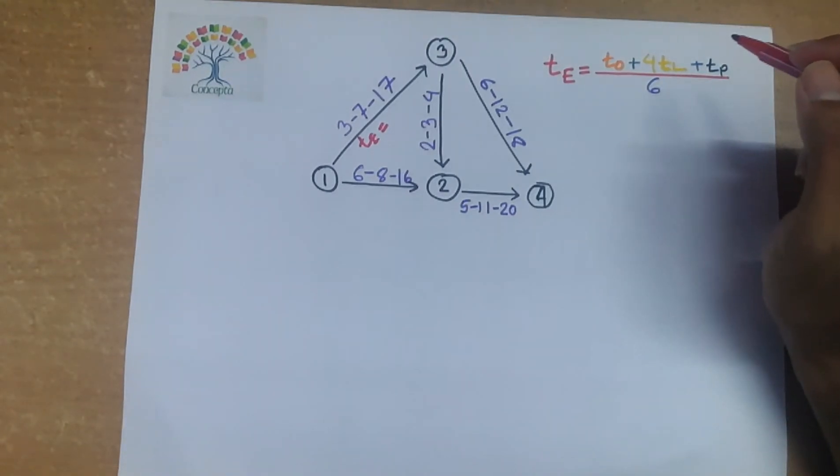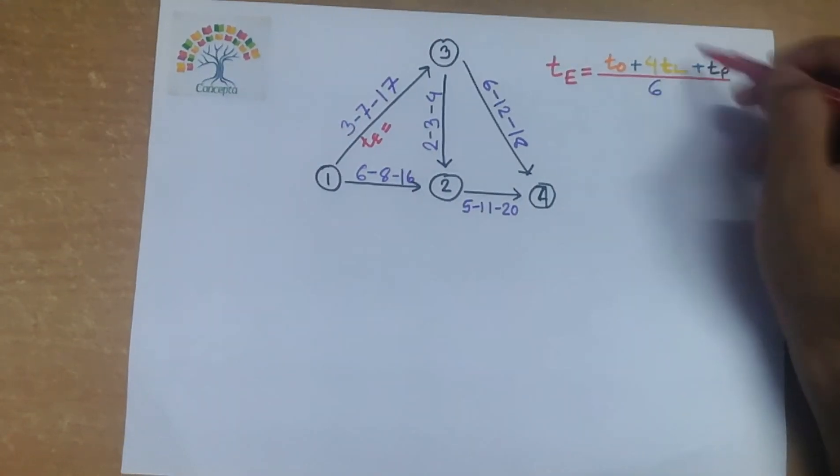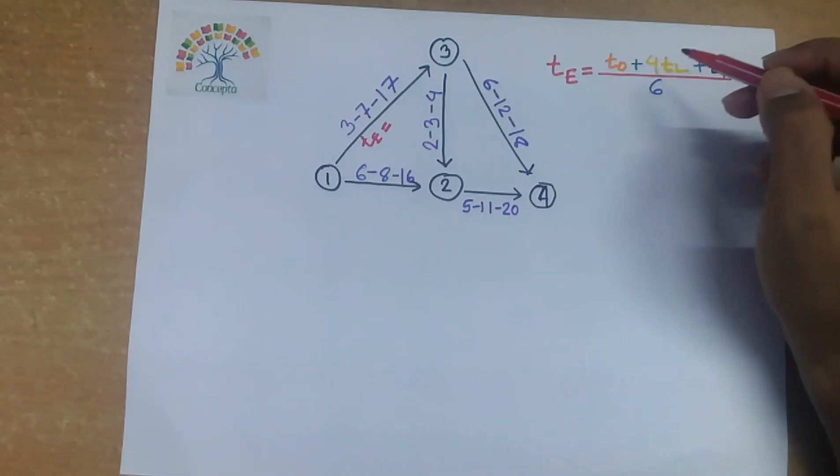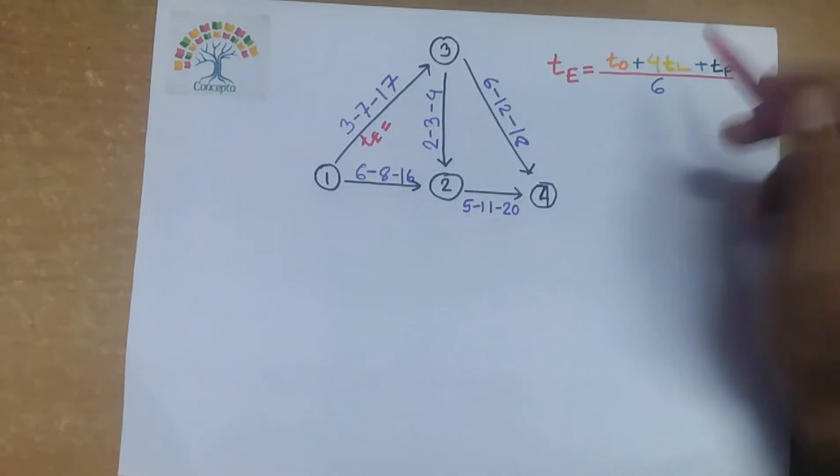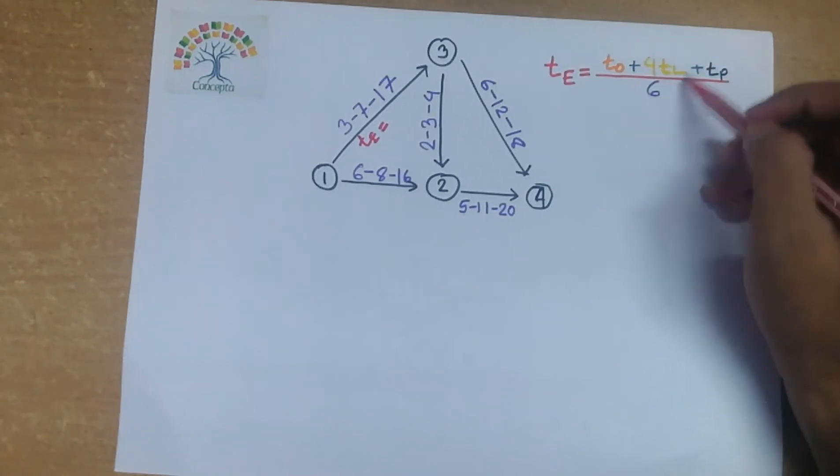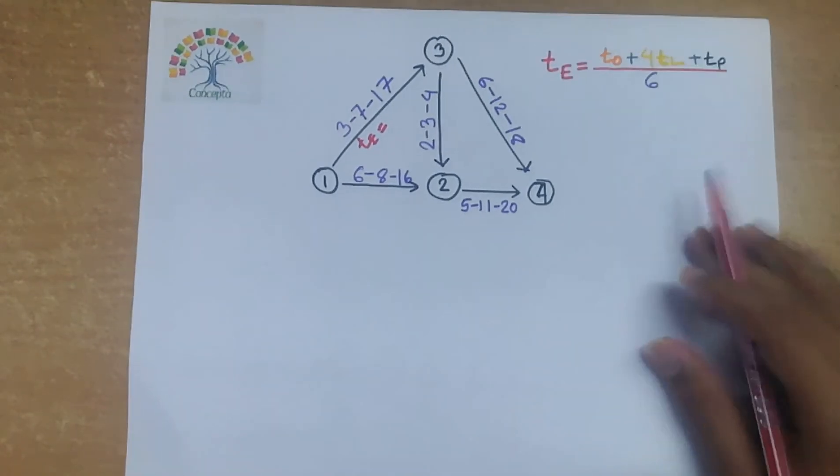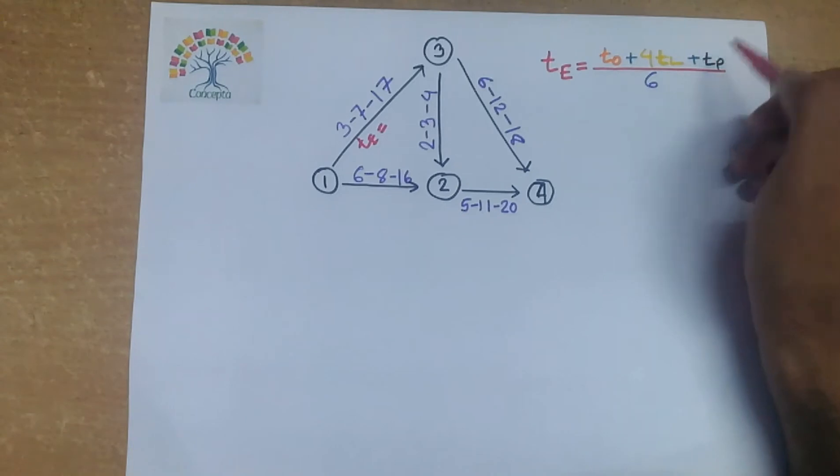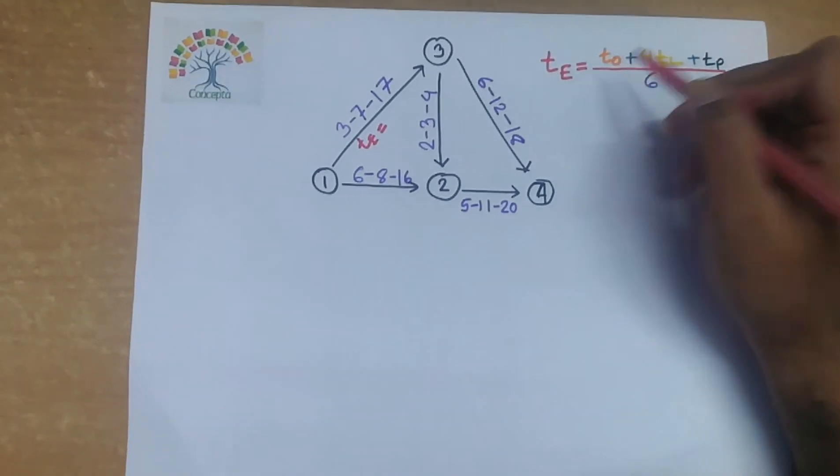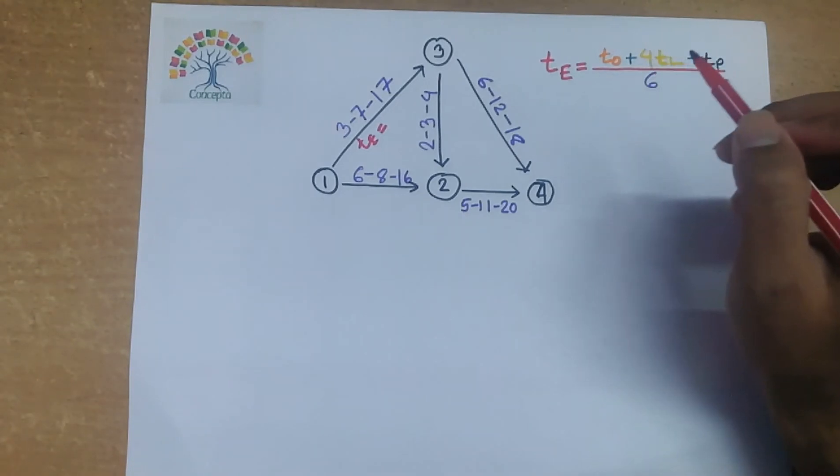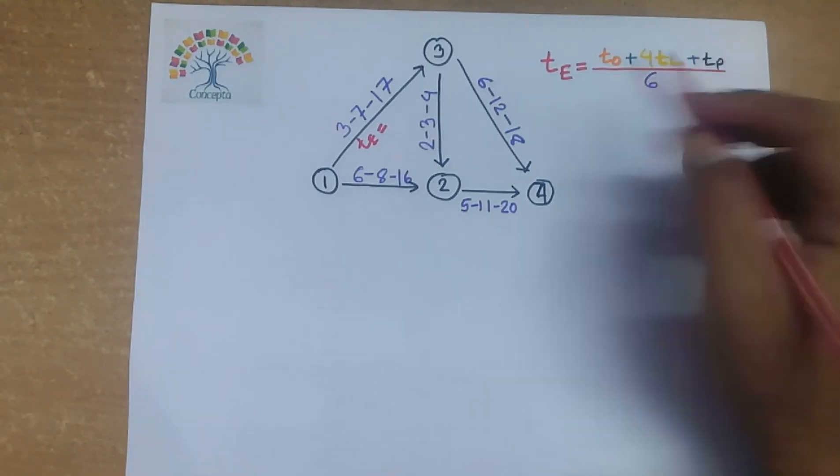Maximum people complete a work within this time, that is tl, so its weight is more compared with tp and t0. So coefficient 4 is written in front of tl, and there is a hidden coefficient 1 in front of tp and t0 as less number of people complete a work within this duration.